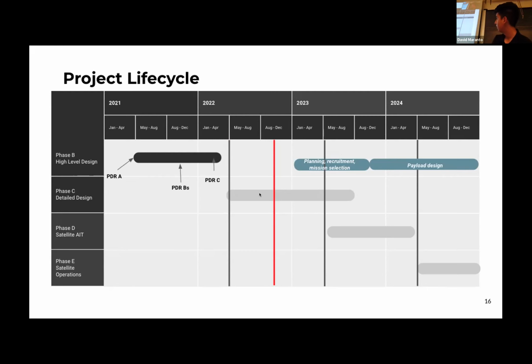There have been several formal design reviews conducted thus far. Those are the PDRs A, B, and C. So we passed all of these over the course of the last 2 years. PDR stands for preliminary design review. Those are the stages in the design where the team comes together and evaluates our high-level design as a team. So we give feedback. And there is very specific entry and exit criteria between the phases that define when a mission can move on to the next phase. And those are defined by the NASA Systems Engineering Handbook. That's all documented there very nicely.